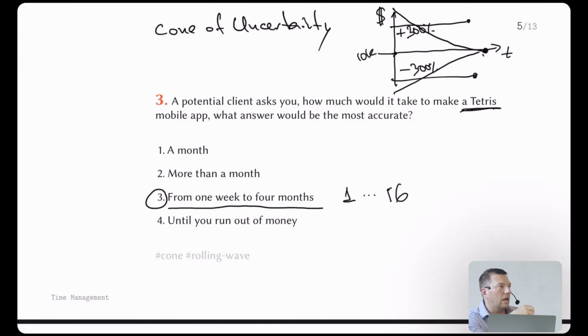Then I go to programmers and ask them to make me the estimate. They will provide me a 3-point estimate: the best case, the most likely, the worst case. And then I summarize all of them. Most likely, the distance will be close to what I'm telling you. The programmers will also put a lot of uncertainty into their numbers. When you combine all these numbers together, you will see that the best case is so small and the worst case is so big that the difference will be close to this. It's not invented by me, it's coming from the industry. These numbers, divided by 4, multiplied by 4, are empirically observed. In your reality, it could be smaller, it could be a bit larger.